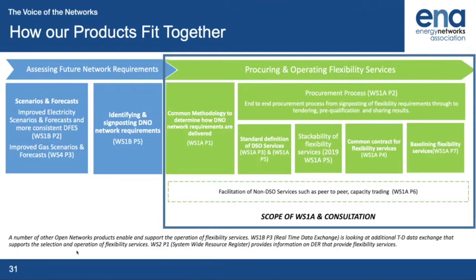And also we've looked to standardize how we evaluate and weight evaluation in our bidding process. So we've looked at the weighting between commercial and technical requirements in the bidding process and how we standardize those across DNOs for their DSO services. So there is another level of detail on the procurement processes that show how we're proposing to align process.